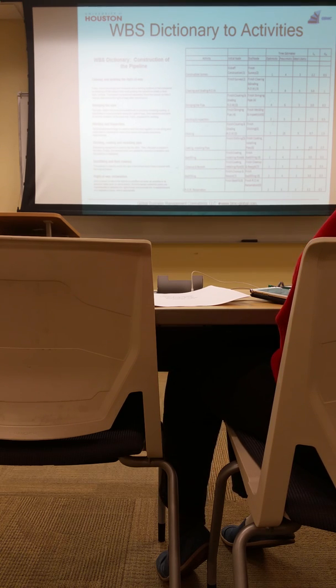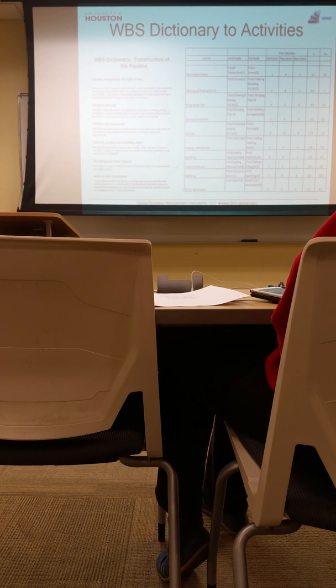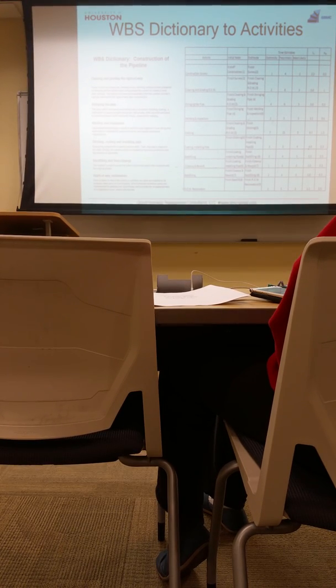Usually the most likely, okay, is a 50-50 chance of finishing, generally. I mean, people will say, well, it'll probably take this much. In reality, that ends up being, yeah, 50 to 70% of the time we'll finish in that much time. Just heuristically, or as a rule of thumb, people underestimate things. Okay? That's why you want to come up with a range. That's why I'm encouraging you to think in terms of ranges now.